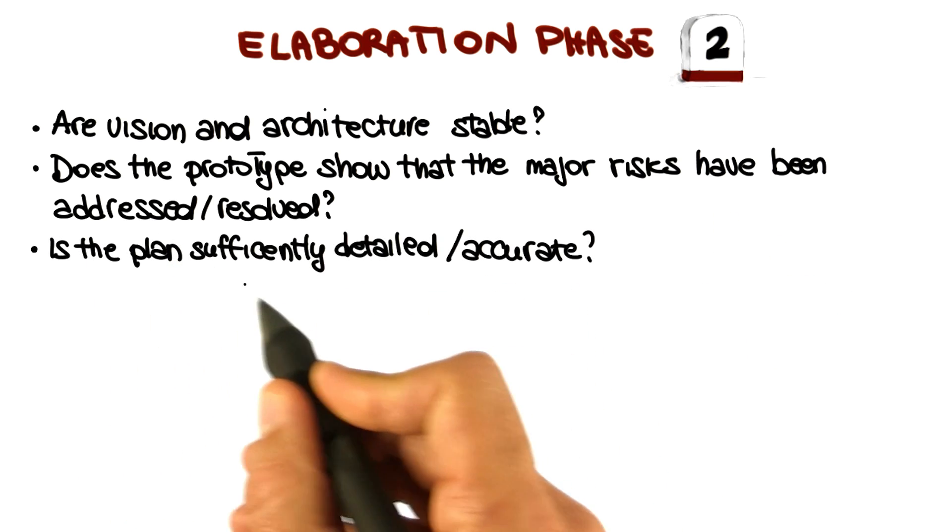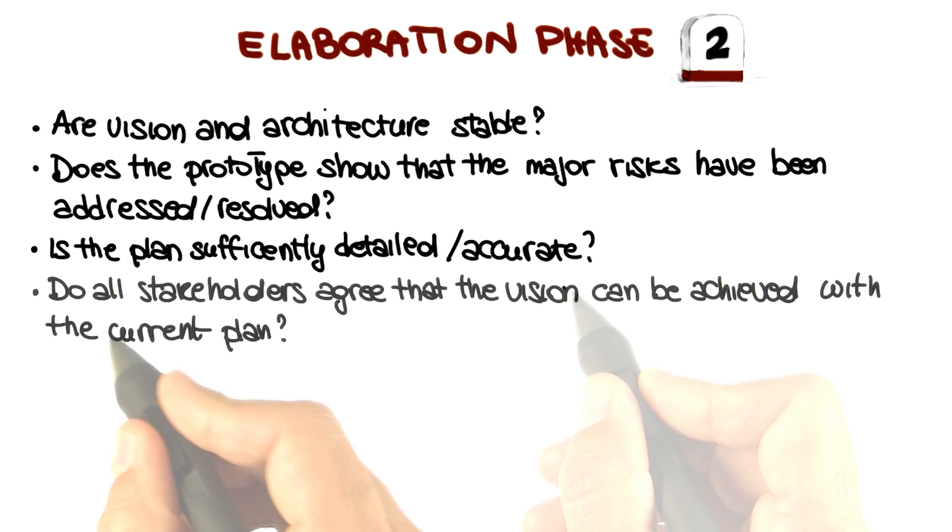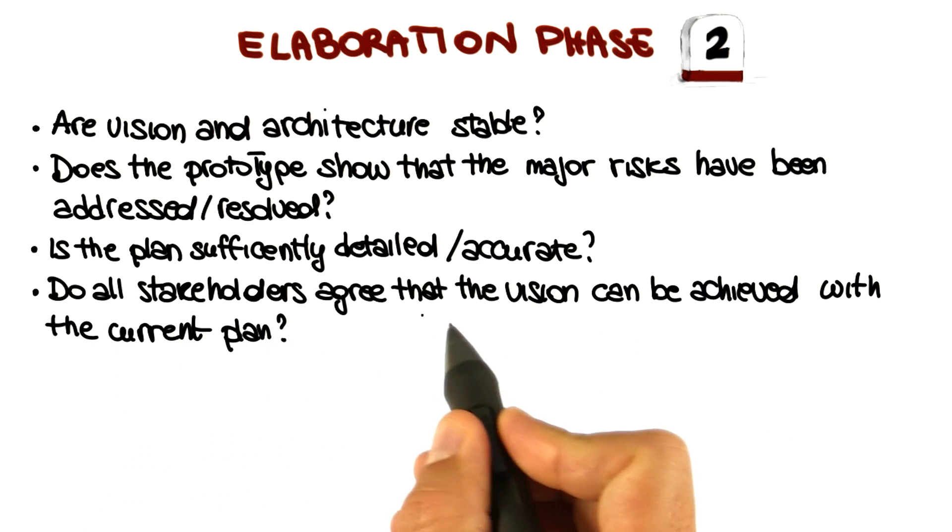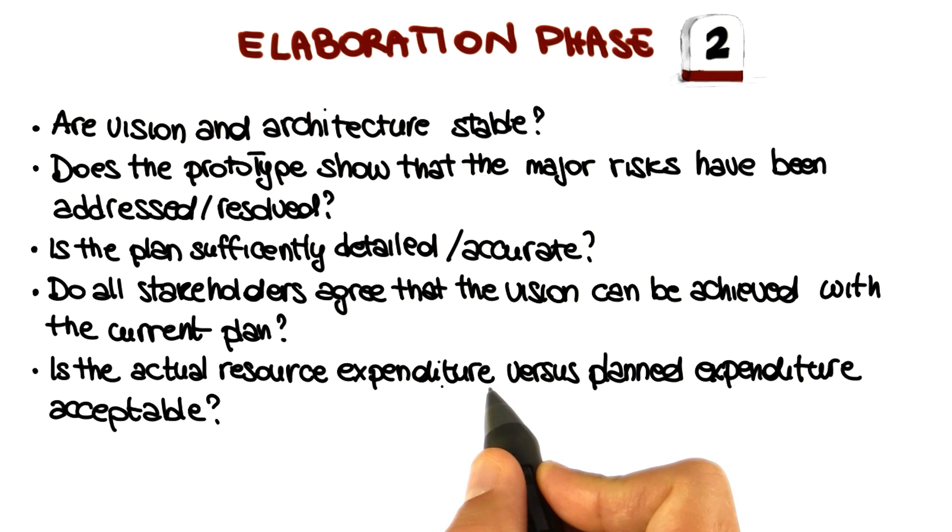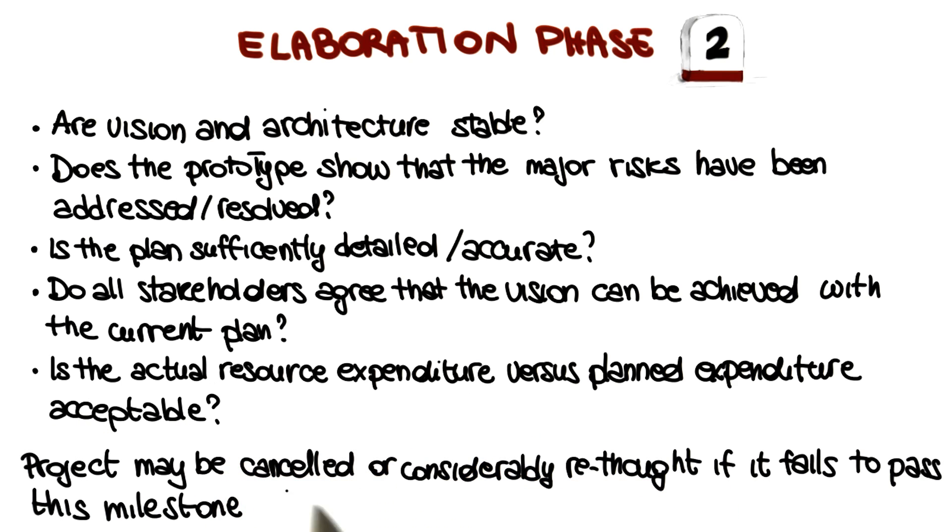Is the project plan sufficiently detailed and accurate? Do all stakeholders agree that the vision can be achieved with the current plan? Is the actual resource expenditure versus the planned expenditure acceptable? Now we started consuming resources and therefore we can check whether our estimates were correct. Also in this case, the project might be cancelled or considerably reshaped if it fails to pass this milestone.